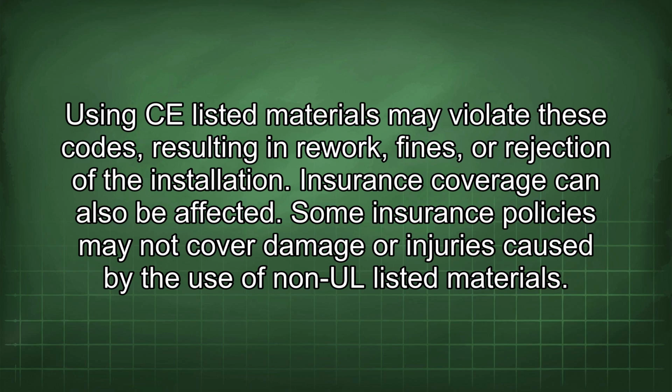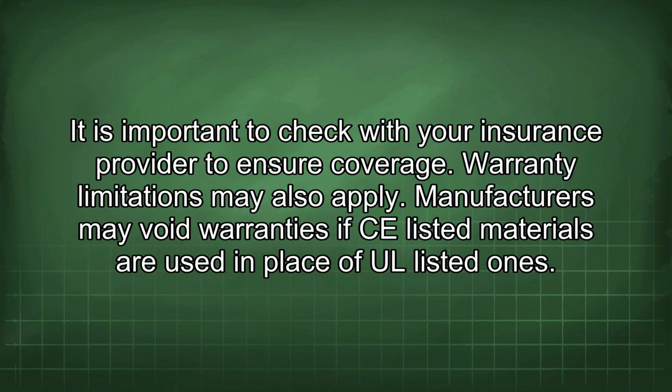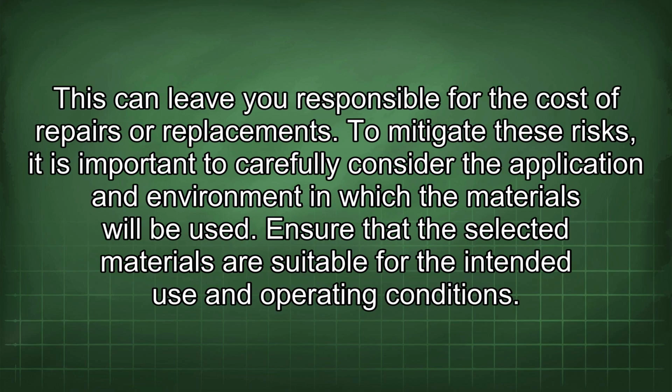Insurance coverage can also be affected. Some insurance policies may not cover damage or injuries caused by the use of non-UL listed materials. It is important to check with your insurance provider to ensure coverage. Warranty limitations may also apply. Manufacturers may void warranties if CE listed materials are used in place of UL listed ones. This can leave you responsible for the cost of repairs or replacements.